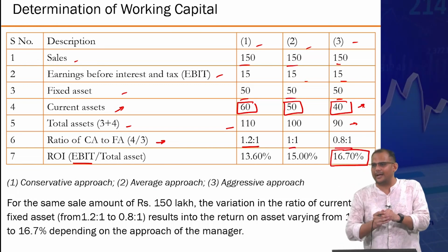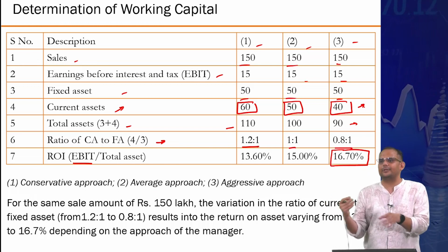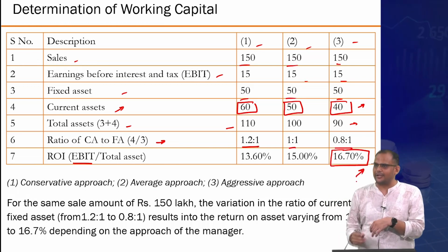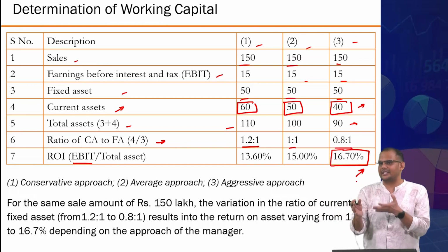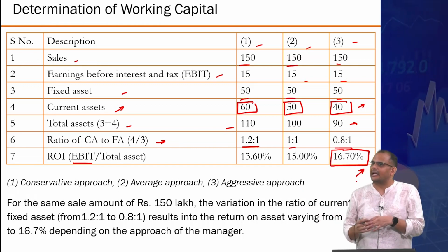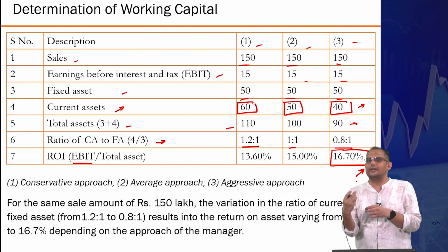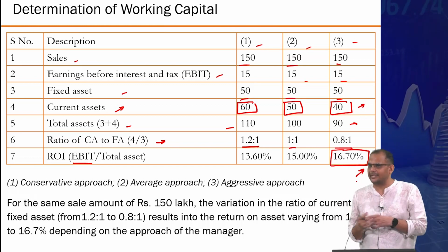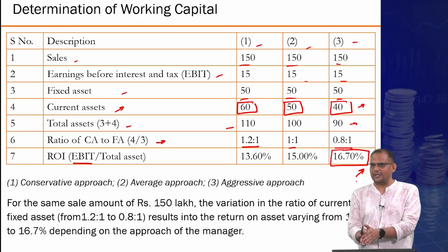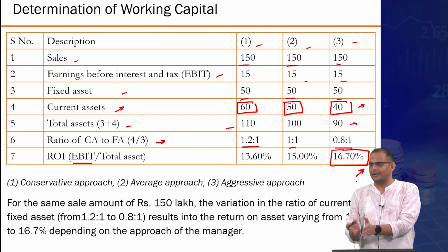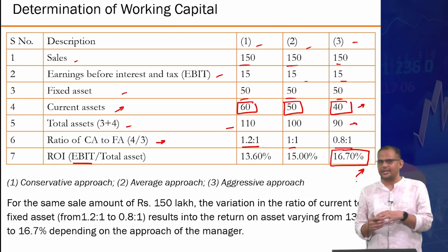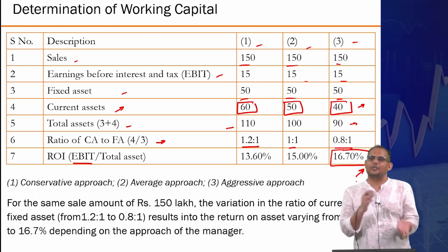So you cannot optimize it too much so as to bring it to the negative or close to zero. If you do that, yes, your returns might go extremely higher, but then your business might also become brittle, in a way that if there is even a minor external shock, it will not be able to pass it through. Resilience is what we call it, right? So in the short term, it can give you high rewards, but it can also make your business really less resilient to external shocks. That's also a trade-off.